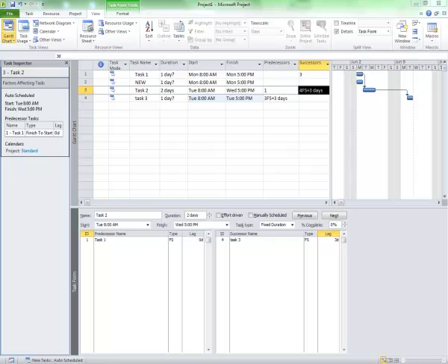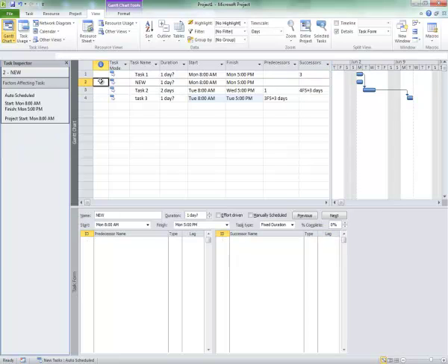So, if you're just creating links, don't do it. And if you see other project managers who have nothing but calendars in the indicator column, they may not know how to use Microsoft Project, because you should very rarely use constraints, and so those calendar icons in the indicators column should not appear very often.